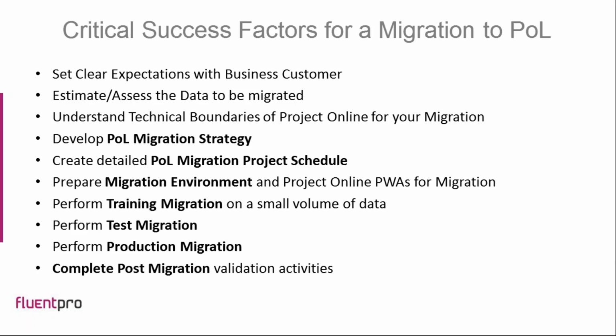The rest are a series of steps that we've talked about before in other migration webinars, but we're big now in developing that migration strategy and having that dialogue with the end customer. What is it that we're going to migrate? What is the sequence of content? You can follow with a detailed project schedule. You're going to have to prepare the migration environments, both source and target, by the way, and train the team that's going to actually perform the migration.